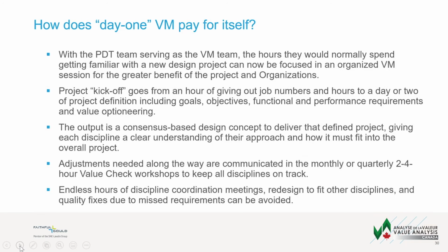So how does Day 1 VM pay for itself? With the project delivery team serving as the VM team, the hours they would normally spend getting familiar with a new design project can now be focused in an organized VM session for the greater benefit of the project and organization. The project kickoff goes from an hour of giving out job numbers and hours to a day or two of project definition, including goals, objectives, functional and performance requirements, and value optioneering. The output is a consensus-based design concept to deliver that defined project,